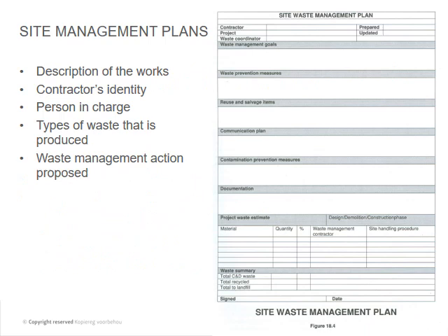Okay, site management plan. Here's a nice example that you guys can use. It's description of the works, contractor identified, person in charge, type of waste that is produced, waste management action proposed. So very straightforward that you guys can have a look at.